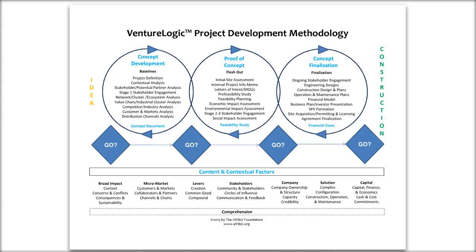There are three major phases or stages. First is concept development — taking that idea and getting down a solid concept and business model of what this could look like. You're not actually proving it out; you're investigating and developing baselines to determine if this project makes sense to go forward. Then in proof of concept, you're fleshing things out and trying to see if this is going to be bankable.